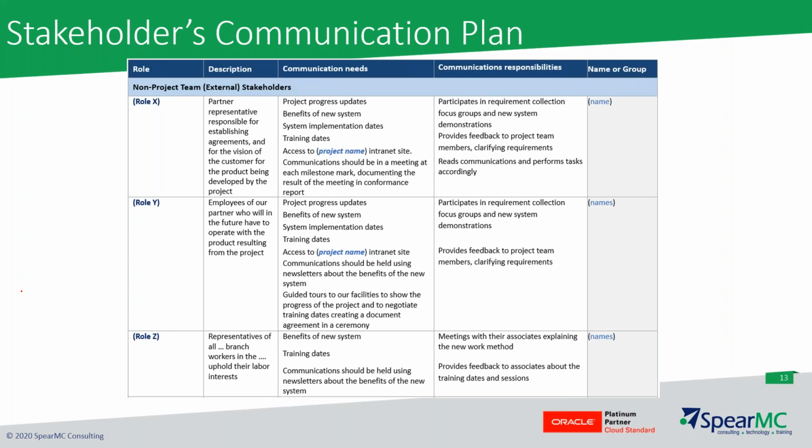Stakeholders communication plan. We sprinkled a little bit on this general topic when we talked about the RACI, people being informed, but this is a step above that. So your communication plan, like the one example here, is really targeting at what intervals am I engaging this person, and within those intervals, at what level am I giving them details for the various milestones that we have within a project. So really good stuff here.